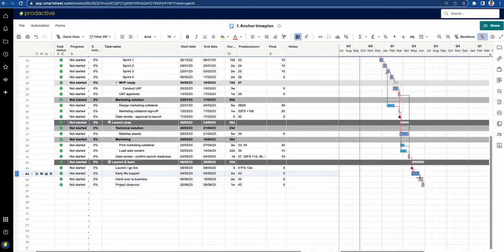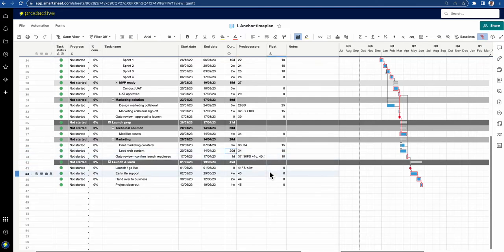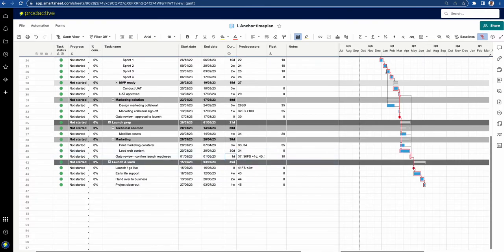Again, it's the shortest time that you can deliver your project in — the critical path — and anything that makes that shortest time longer affects it. So I'm going to undo that. Items not on the critical path — for example 'load web content' — currently have 20 days duration. But if the team takes longer, say 30 days, then suddenly it is on the critical path and impacts the project.